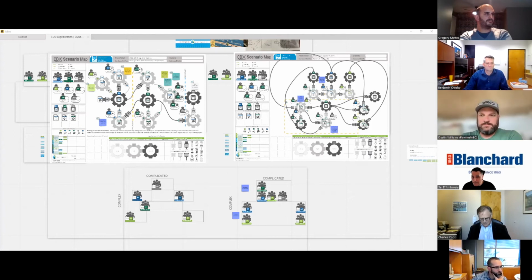But we've all seen it, right? RFIs can get abused by people creating a ton of RFIs, like for dimensional layouts. Dimensions aren't shown on the drawings. Well, you have to RFI it because you're not supposed to scale the drawing. So you submit an RFI to get those dimensions back and forth. And it's things like that that really bog down the entire process.